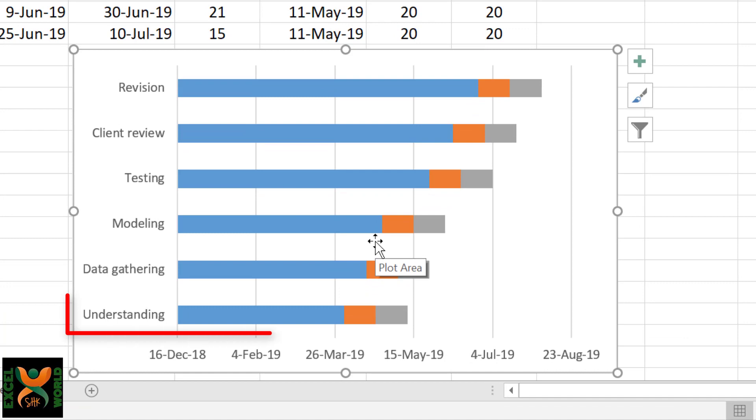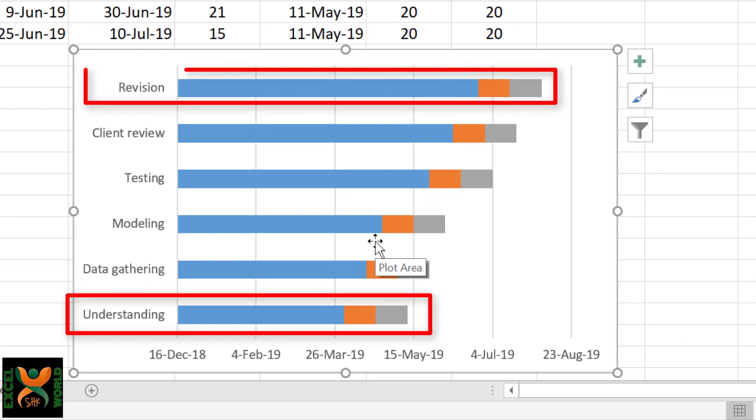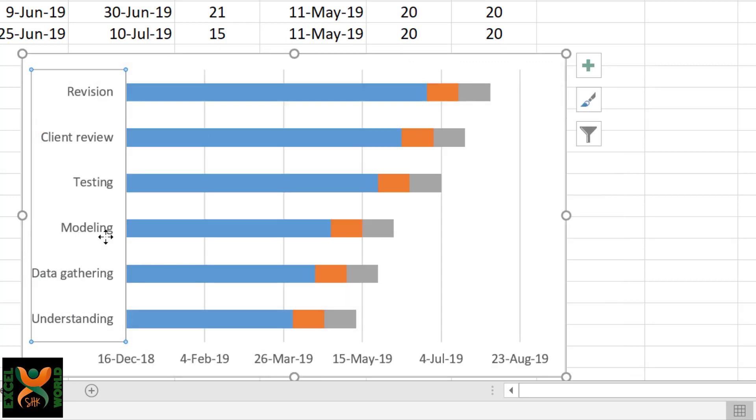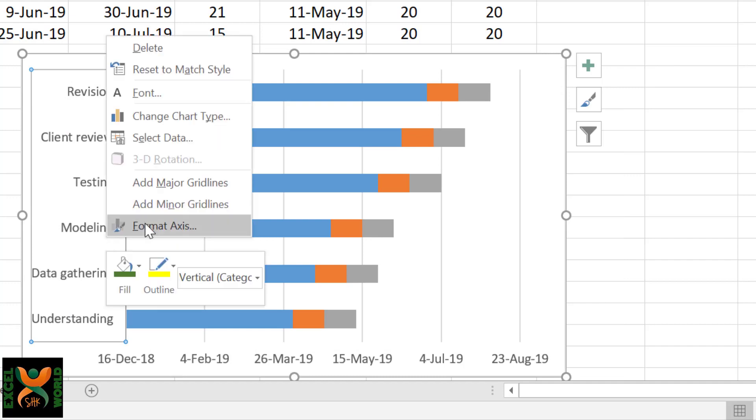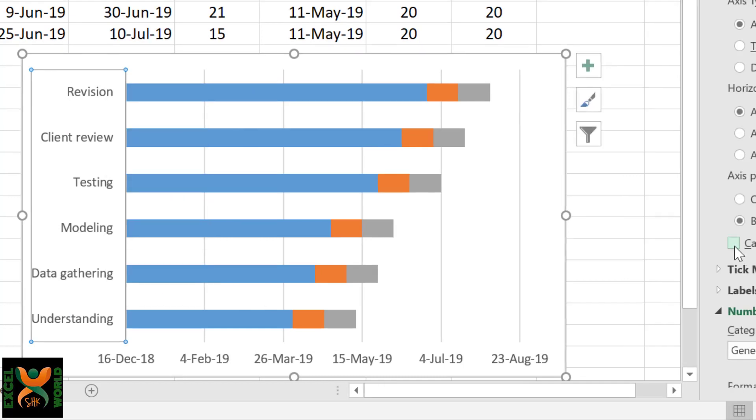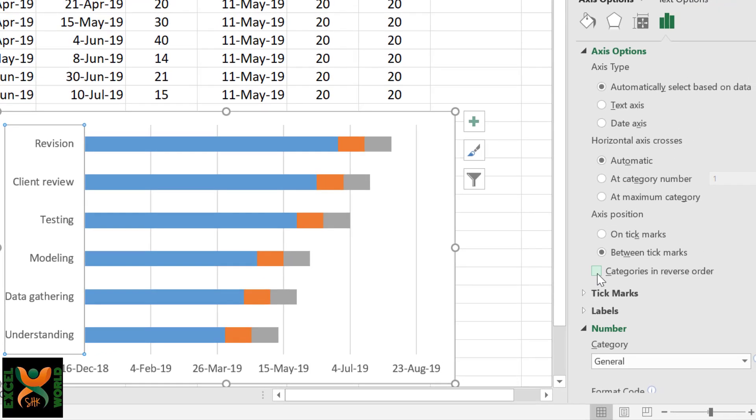Our first task is coming at the last number, and our last task, which is Revision, is coming at the start. So we need to reverse this order. For this, select the vertical axis, right-click, Format Axis, and click Categories in Reverse Order.